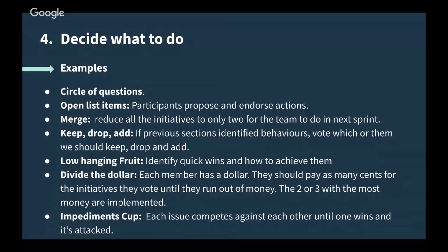Keep, drop, add. This is for behaviors mostly. So if there are behaviors that we want to change or to keep, here is what we are going to do. This is, for example, like if in a previous section you identified that you want to do more daily meetings. Okay, here you vote to do more daily meetings or not, because maybe that was the impression of someone and not everyone is in agreement.